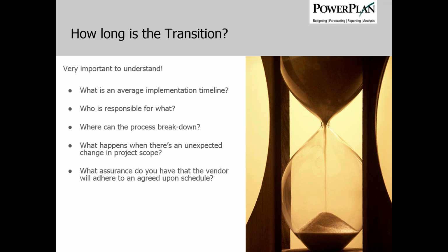And when we give those timelines, I'm not suggesting that somebody is working full-time non-stop, but that's the span of the timeline with the project plan in place and tasks and dependencies identified. Again, we talked about knowing who is responsible for what, and that's where having a project plan and a proposed schedule, and knowing the expected resource usages, come into play.